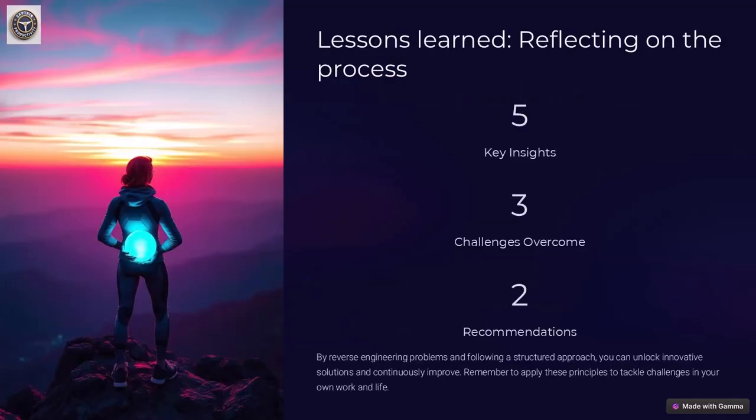Reflecting on lessons learned helps identify key insights and recommendations for future challenges. For instance, a project team might realize that their initial scope was too broad, leading to delays, but the solution they implemented streamlined communication effectively. By documenting these insights, such as the importance of narrowing the scope and improving stakeholder engagement, the team can apply these lessons to future projects for even better outcomes.